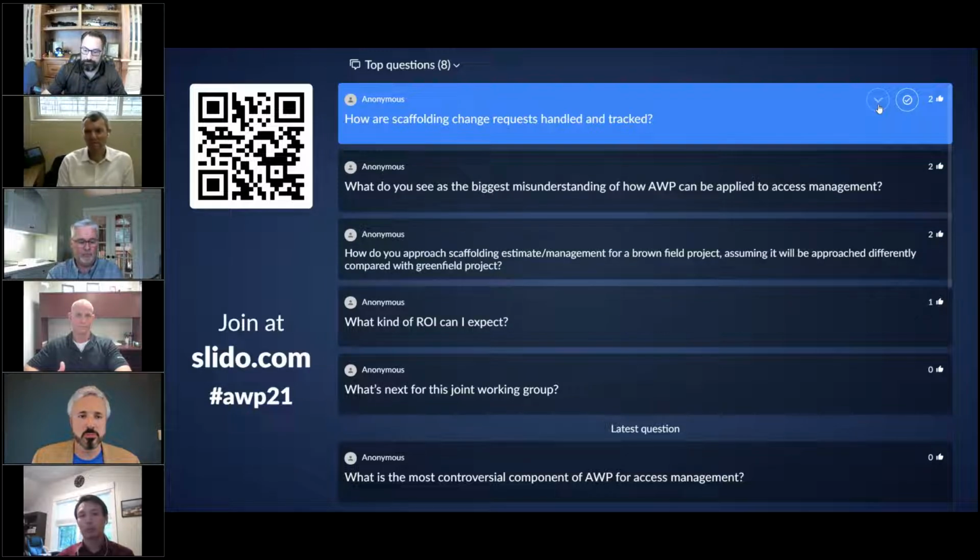The scaffolds are based with the scaffold labor being a percentage of DFL hours. So the only way you really get scaffold changes is when you change the direct scope. When you do, you get a proportionate amount of scaffold hours and scaffold costs that come with it. That's typically how I've seen it done. But outside of that change in direct scope, when additional scaffold work is needed, it's not really a change. It just goes into the general scaffold budget.